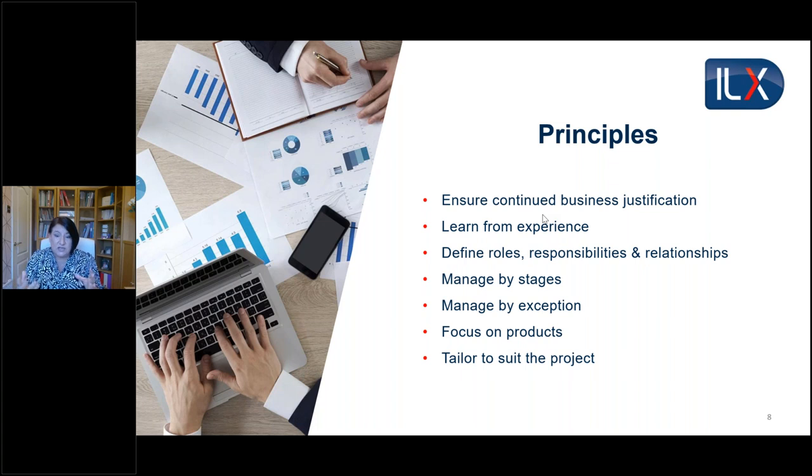Manage by stages. Rather than looking at the project as one big chunk, we're going to break it down to be more manageable. As a minimum, we'd have at least two stages. The first stage to plan what we're going to do, which we refer to as the initiation stage. Then the second stage would be to do everything and close it down. But that second stage, we can break down further if it makes it more manageable for that project.